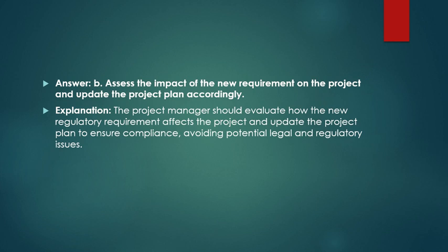Answer is assess the impact of the new requirement on the project and update the project plan accordingly. The project manager should evaluate how the new regulatory requirement affects the project and update the project management plan to ensure compliance, avoiding potential legal and regulatory issues.